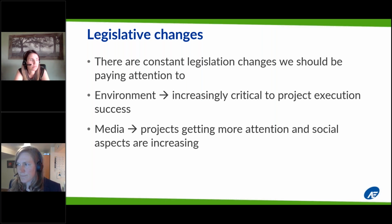And I'll just touch on a very brief example of that, where contractors were given the go-ahead to go in and create a laydown area before they started a project. And there was a miscommunication, and they went in and knocked down a bunch of fence to set up their laydown area, but that fence actually had bird boxes on it. And those bird boxes were occupied.